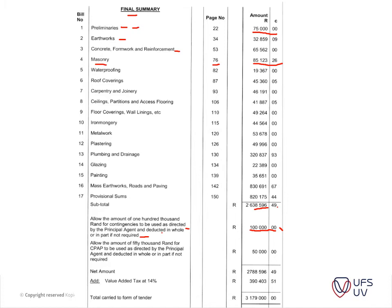You also allow an amount — say 50,000 rand — for contract price adjustment, which is basically inflation, calculated using certain indices. On projects running over a couple of years this amount is very important. You get your net amount measured, add VAT, and get your final tendered amount, which is carried to the tender form. If successful, this is signed and becomes the contract amount the contractor is bound to — it becomes a quote to the client.